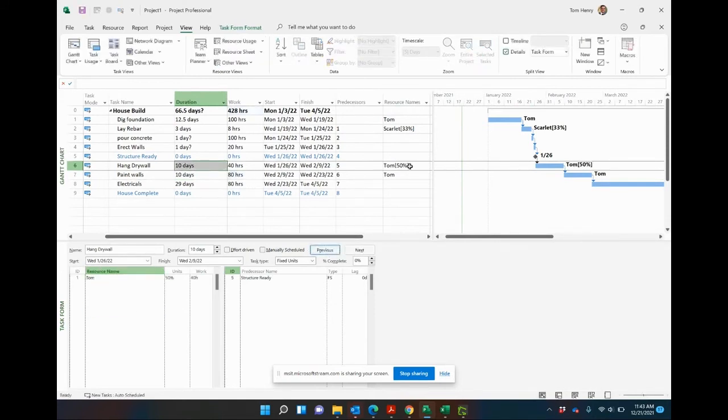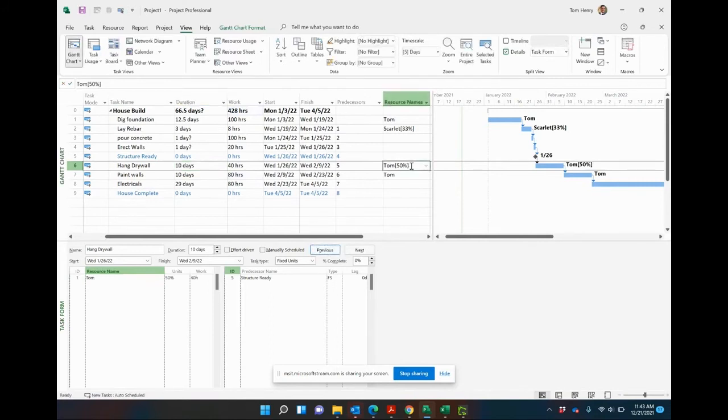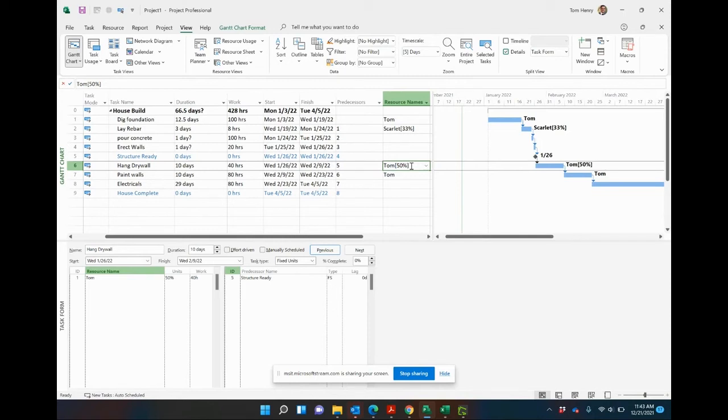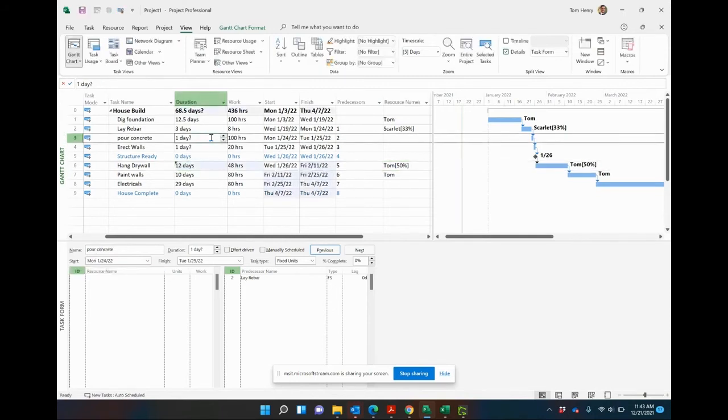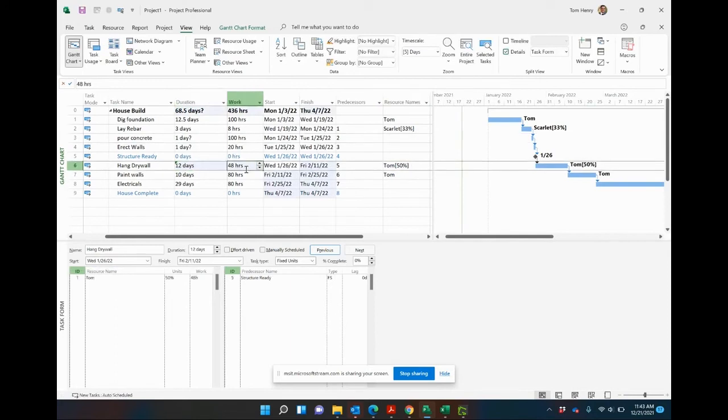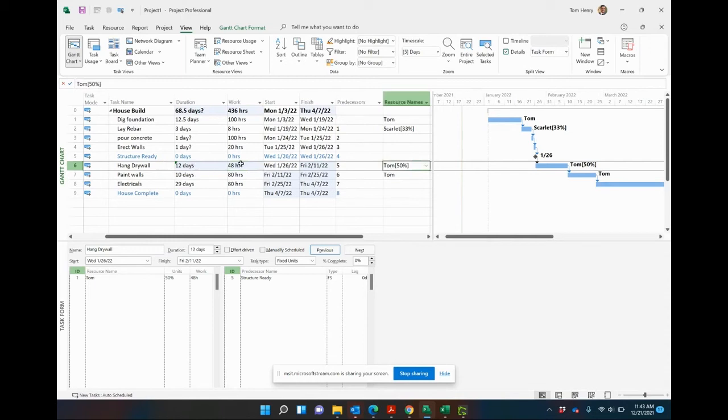You can see Tom's working 50 percent. We supply two variables, Microsoft Project calculates the third. By estimating the duration and the work, Microsoft Project is always going to calculate the units for us. So if we do increase the duration, you see the work is actually going to go up proportionately to the units of that particular resource. So we put an extra two days, it added an extra eight hours because he's only working part-time, 50 percent units, which is four hours per day.